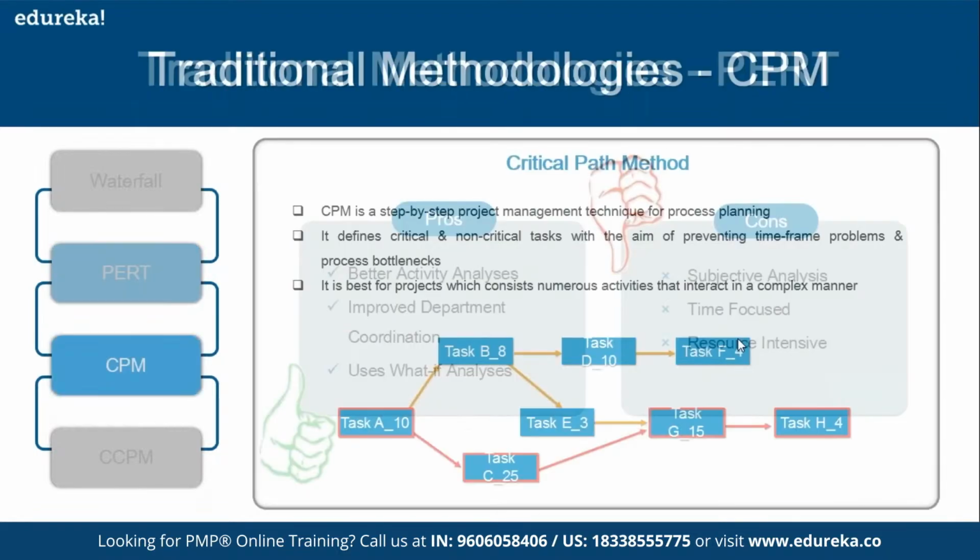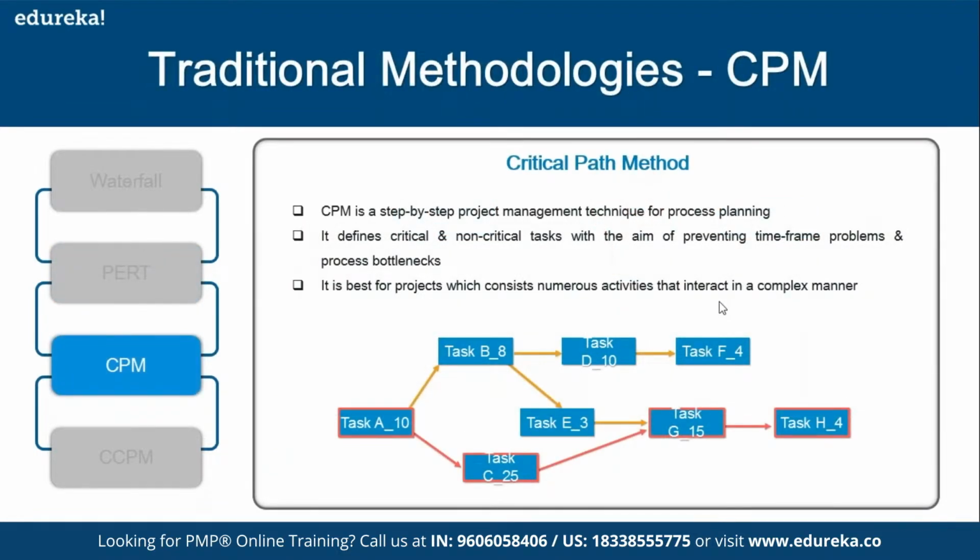Then the critical path method, a very widely used technique when we talk about PMP and schedule management. When we talk about critical path, we will talk about organizing the whole work into some kind of a sequence, trying to understand what dependencies are there. We talk about the vocabulary called predecessor and successor items.